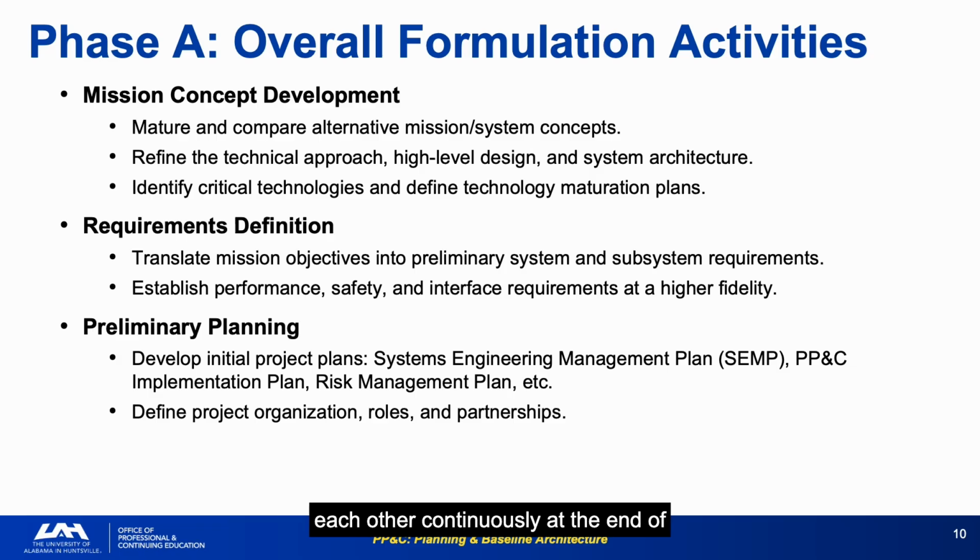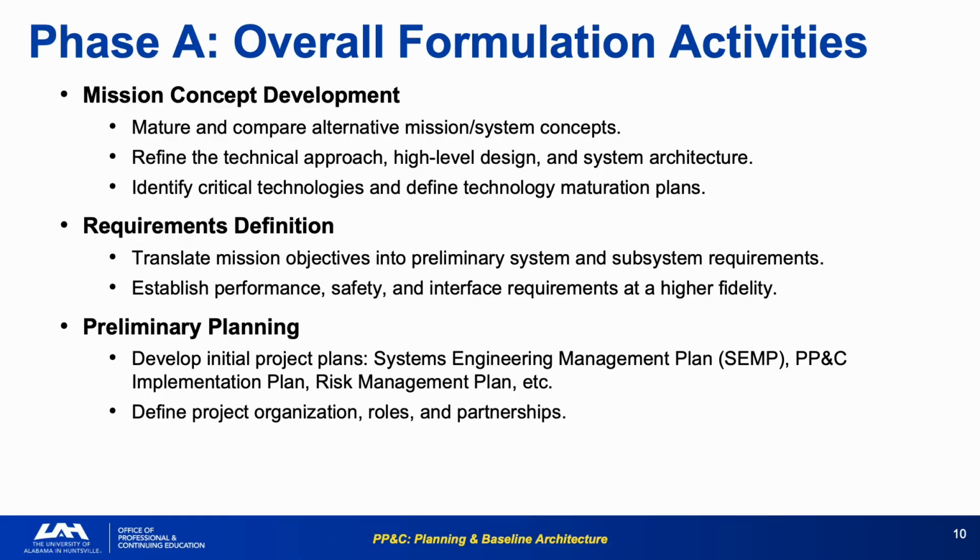At the end of Phase A, the project needs to demonstrate a viable concept with a preliminary resource plan. The specific PP&C deliverables are initial cost estimates, preliminary IMS, and a high-level risk register. Phase A is when you have the most latitude to get the framing right. Assumptions embedded in Phase A estimates tend to persist. They become the heritage data that informs everything downstream.